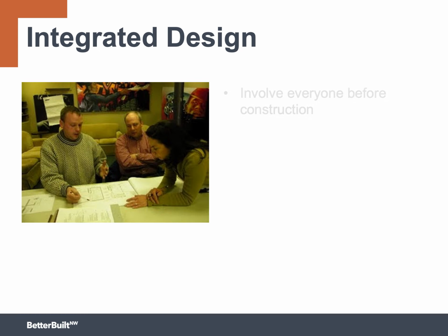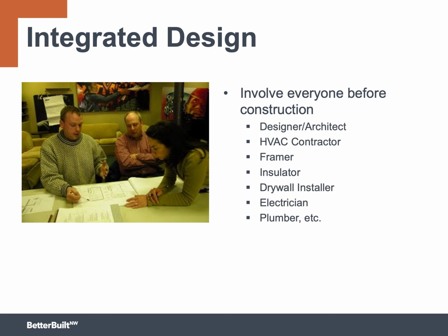Integrated design means that everyone is involved in the creation of the design. That means all of the trades guided by the general contractor. For the first Ducts Inside project, it's essential to have all the trades sit down face to face. If these people are sitting down together, they can agree exactly on where the components are going to be, how they're going to be installed, and what the construction sequence is going to be.